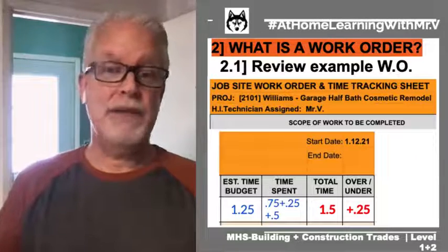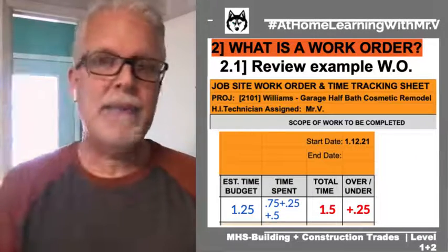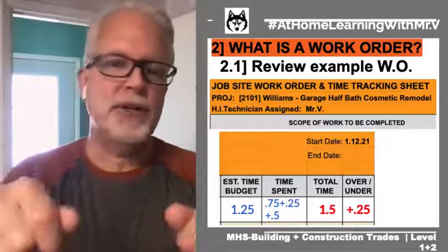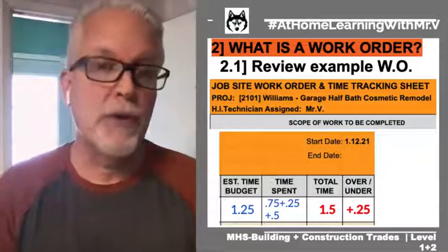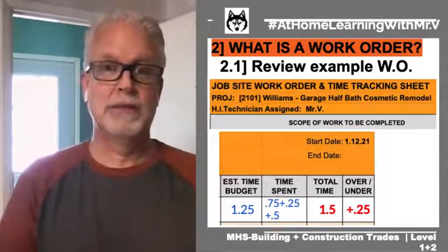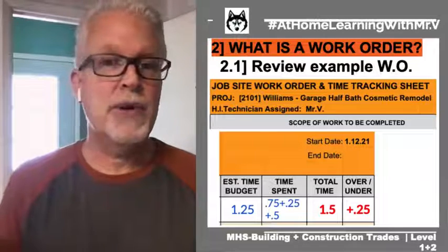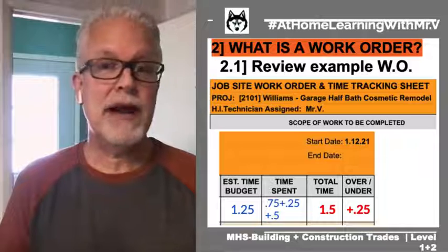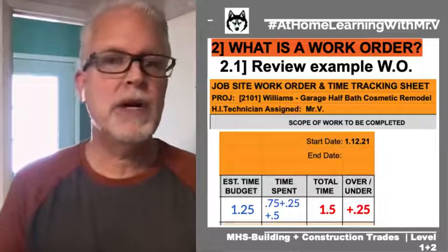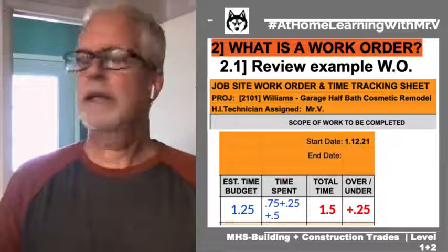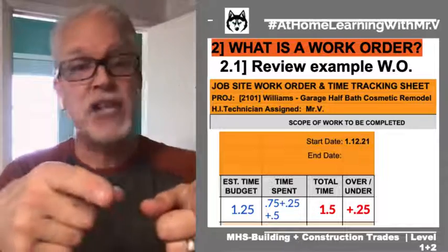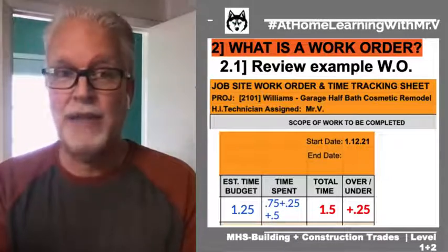Really bad day. If I was out here in the field, I filled out my whole time log sheet, I turned it back in to the owner, and I was over 3.5 hours total. Who's going to pay for the 3.5 hours? Okay, 3.5 hours times $75 an hour. We're in the $200, $250 thing. Am I going to take it out of your paycheck? No, I can't do that legally.